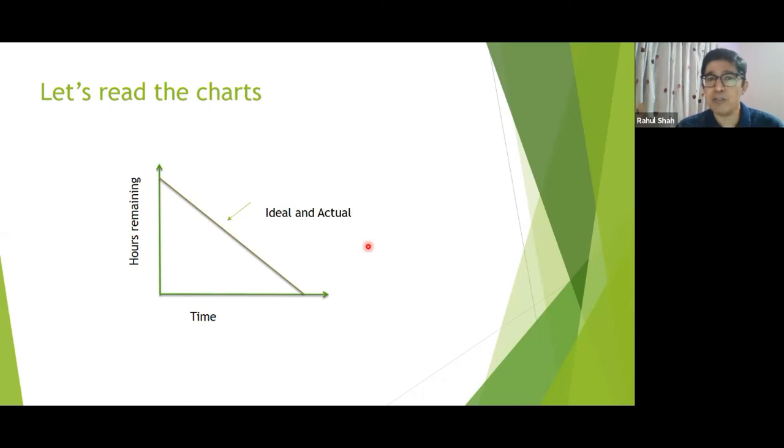There is no doubt, no technology challenges, no people challenges, and the buffer is there or additional buffers are there. They have too much buffer, so they are not worried about this one. Scrum shouldn't be implemented if everything is crystal clear. You will be spending more time in events. If everything is clear, then probably go for the waterfall way of working.